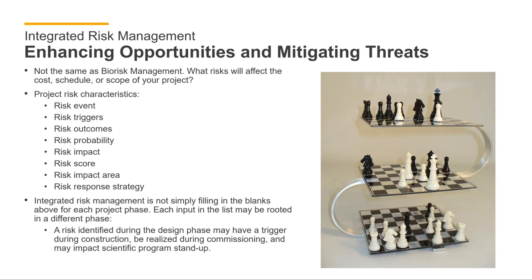For example, a risk that might have been identified during the design phase, such as choosing the wrong floor material for your animal holding rooms, may have a trigger that is realized or observed during the construction phase, such as the epoxy material isn't passing initial sanitation tests. That may have an outcome during the commissioning stage, which is you're not passing your actual commissioning tests overseen by regulators, and has a sister impact area on the science program schedule and ability to start performing research or diagnostics in your facility.